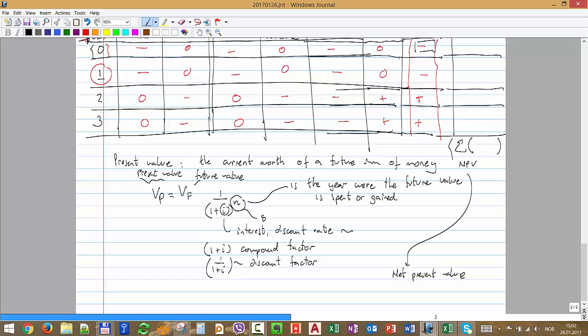If I want to go for that project, the net present value has to be positive. And if it's very positive, it means that I will get a high financial gain for this project. How many of you saw this before? Not many? Okay. Some of you have seen it for the first time. That is the main economical indicator of the project.